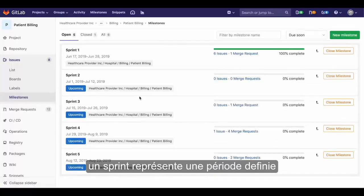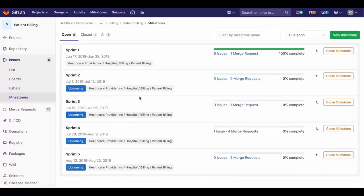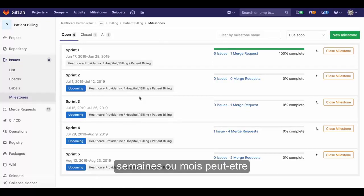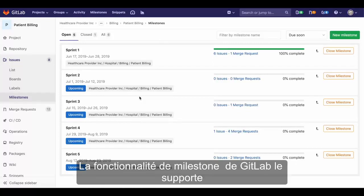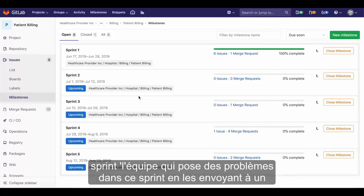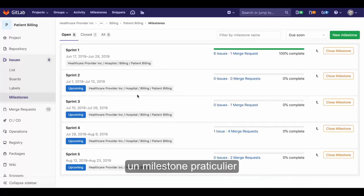A sprint represents a finite time period in which work is to be completed, which may be a week, a few weeks, or perhaps a month or more. GitLab's milestone feature supports this. Assign milestones a start date and a due date to capture the time period of the sprint. The team then puts issues into that sprint by assigning them to the particular milestone.